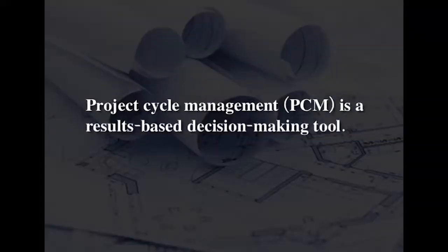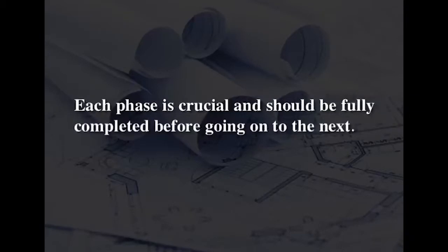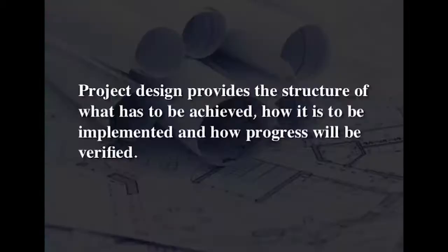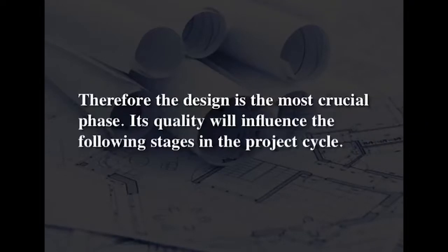Project cycle management, or PCM, is a results-based decision-making tool. Each phase is crucial and should be fully completed before going on to the next. Programming new projects will draw on the final evaluation in a structured process of feedback and institutional learning. Design is the starting point of the project cycle. Project design provides a structure of what has to be achieved, how it is to be implemented, and how progress will be verified. Therefore, the design is the most crucial phase. Its quality will influence the following stages in the project cycle.